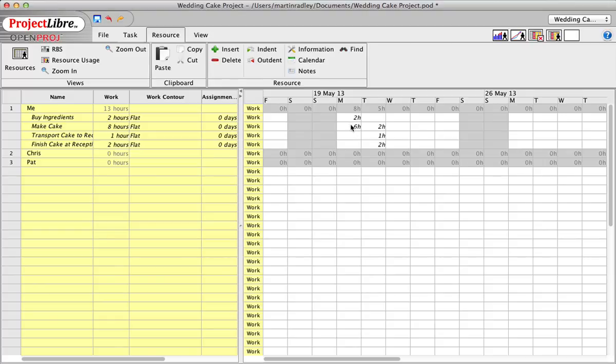Okay, so I want to warn you though that project management tools do not automatically adjust resource assignments in all cases. Now you would think that project management tools, in this day and age, would have algorithms to automatically assign resources to tasks for us, but as far as I know, they don't. They have some tools that do it to a certain degree, but not to the degree that a lot of project managers expect.